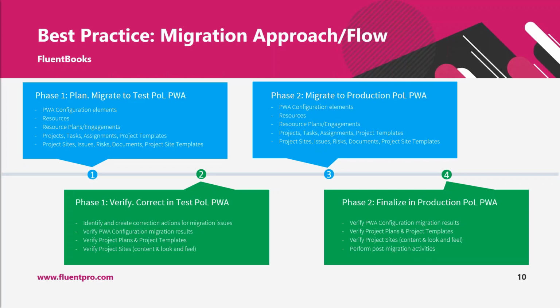This approach requires really careful planning, because it will be hard for users to work with two environments simultaneously. But this approach also is doable, and if users change their projects on a daily basis, it is perhaps the only approach that would allow you to migrate without freezing the source environment for several weeks.